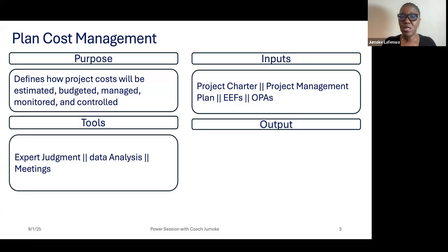This is important because for schedule, we spoke about WBS, the work breakdown structure. You know that is the decomposition, is breaking down the project into smaller components. And the lowest part, I always say this because they could ask you about that, the work packages. So you have the work packages as the lowest element in the WBS. In order to estimate cost or schedule or time, you break the work packages down into activities, and then you have an activity list that will list all the activities.